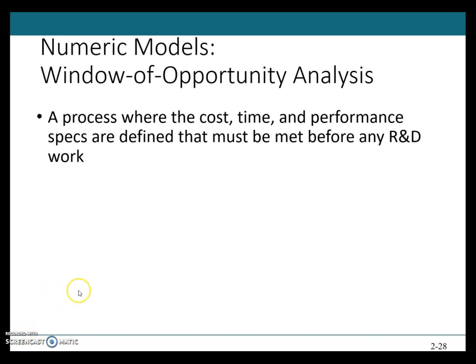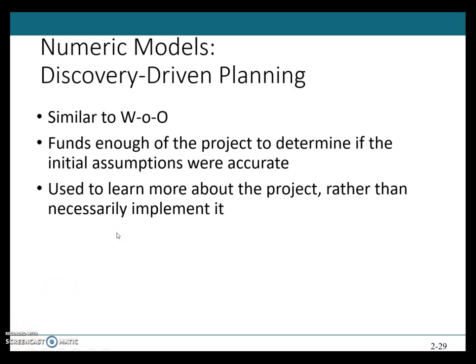The next is discovery driven planning. So it is similar to the window of opportunity method. Like the window of opportunity analysis, discovery driven planning also reverses the expensive and risky traditional approach of trying out the technology to determine its benefit. This approach funds enough of the project to determine if the initial assumptions concerning cost, benefits, etc. were accurate. So when the funds are gone, the assumptions are re-evaluated to determine what to do next.